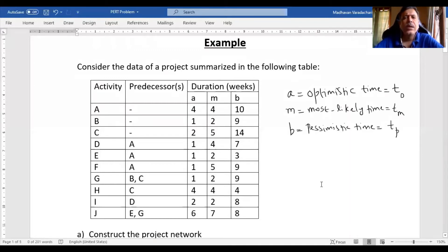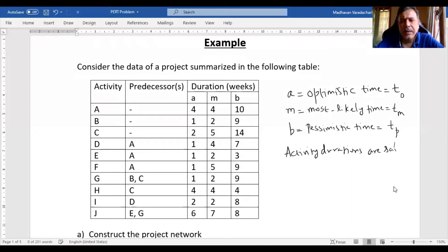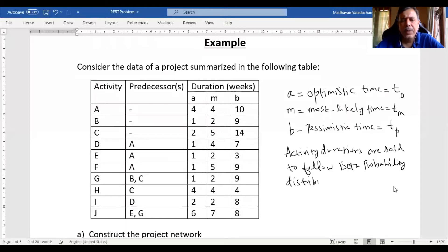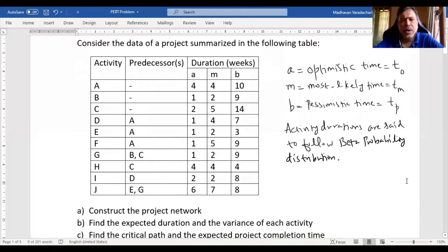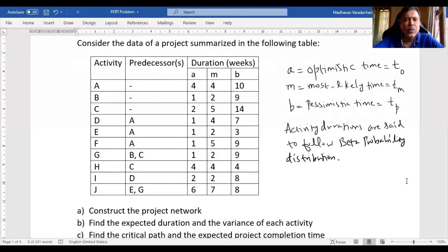In most projects, the duration of an activity is uncertain — it is probabilistic, not deterministic. Activity durations are said to follow a beta probability distribution. For convenience, when calculating probabilities, we convert this beta distribution approximately to a standard normal distribution, so we can use tables to find the probability for a given duration, or find the required duration if a probability is given.